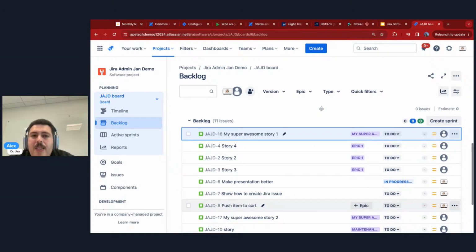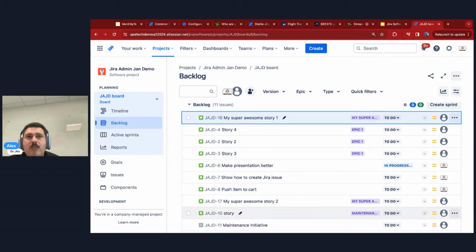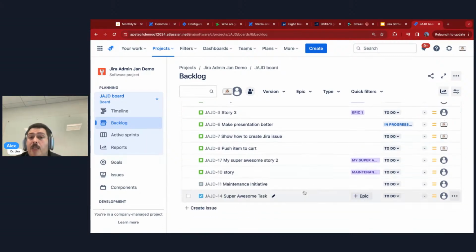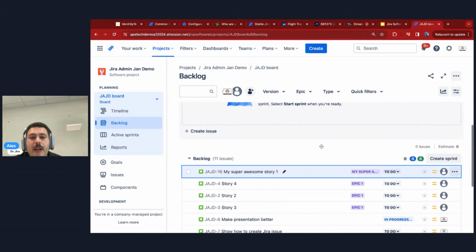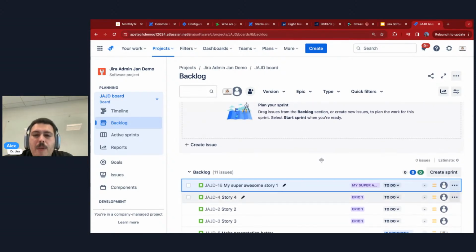And this is really powerful, because what you're supposed to do, if you've ever taken an Agile training, is refine your backlog. You are making the order, making sure you have your definition of ready and your acceptance criteria. You're making sure these stories or tasks are ready for your team to engage, because you don't want your team to be assigned a story only to go figure out requirements, because that's just going to delay the whole process. So this backlog allows you to take items at the bottom, which still need a lot of love and attention and are not ready for prime time, versus items at the top of your backlog, which are supposed to be more ready for prime time.